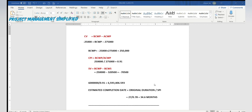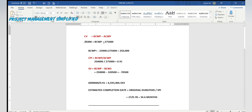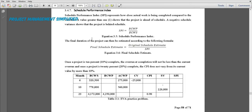For the sixth month, we have the cost variance but need BCWP, CPI, schedule variance SV, and SPI. Using CV = BCWP minus ACWP: negative 25,000 equals BCWP minus 275,000, so BCWP equals 250,000.